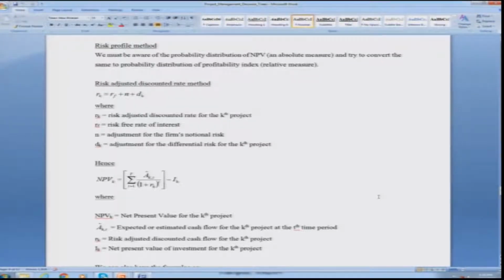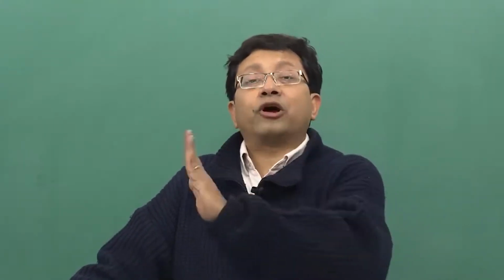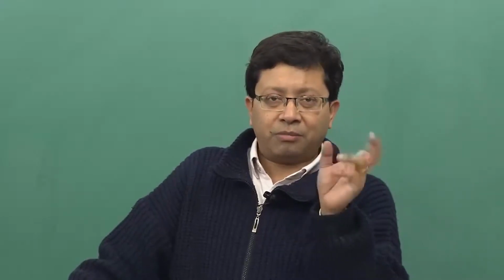Now, what we have is basically 2 terms. Inside the square bracket is the positive term, and outside the square bracket this Ik has a negative. So, Ik basically means the overall investment which you are going to do, or say for example, the sunk cost, fixed cost, variable cost, which are done at a particular time. So, or at different points of time. I am not using the word only at a fixed point of time, it can be at different points.